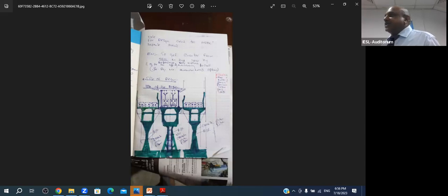And these days, we are trying hard to bring the cost of constructing 1 square meter of a building to 60,000 to 80,000 rupees. But if you ask anybody these days, the majority will say 12,000 to 15,000. We are trying to hit half of that. Same for bridges. I have done a bridge 300 feet long, 10 feet wide in my younger days. And the cost, in 2012, was 2,000 rupees per square foot or 20,000 rupees per square meter.